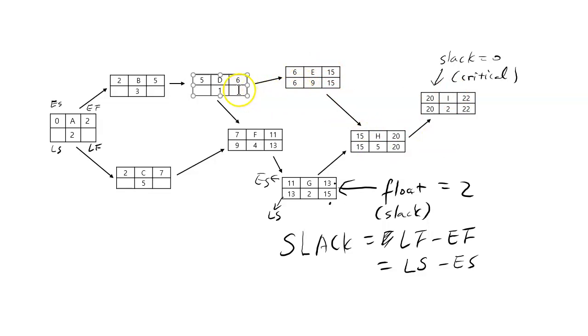So that's not good. So this time, see, in the forward pass, we are taking the higher number of the two. Here, in the backward pass, you take the lower number of the two. And 6 and 9, the lower number is 6. So you put 6 there. 6 minus 1 is 5. On the other hand, here's 9, so you put 9 there. 9 minus 5 is 4. Okay, 5 here. 5 minus 3 is 2. Okay, and then again, 2 and 4, you take the lower number, so this is 2, and this is 0. Okay.